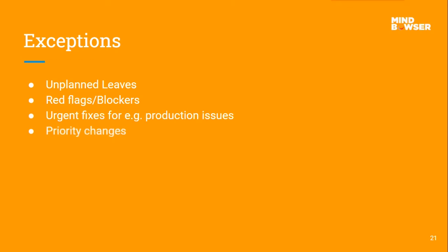And if the client has brought in a priority in between, for example, you are already running a sprint, but the client thinks we should do this feature, which is high priority. For such a scenario, basically we try to say no to changes. We don't take anything in between. Ideally, you should not take any changes, because you already went through all the discussion and prioritization process in the beginning. So ideally, it should not allow any changes.